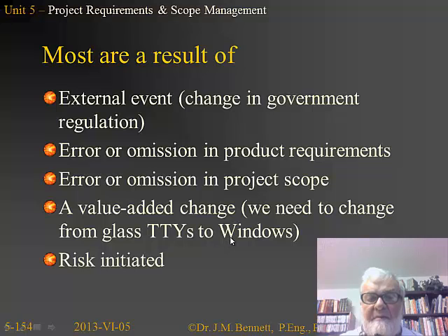All 85 departments all deployed Windows on their own and started developing their applications. And then along came these guys and said, oh, we want you to use our new unified accounting system. And by the way, we won't be using Windows. Only one of the 85 departments accepted the project. It was a massive failure because here was a value-added change that should have been done.